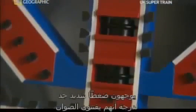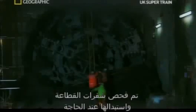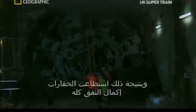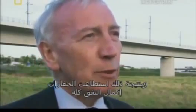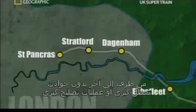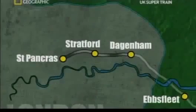They modify the cutter head with nearly 50 cutter discs, each a ton of hardened steel. They exert so much pressure they shatter flint. Yet even steel discs wear out. When a tunnel boring machine arrived at a ventilation shaft position, the cutting blades were inspected and, where necessary, replaced. And as a consequence, the tunnel boring machines were capable of completing the whole tunnel from one end to the other without major breakdowns or refurbishments.